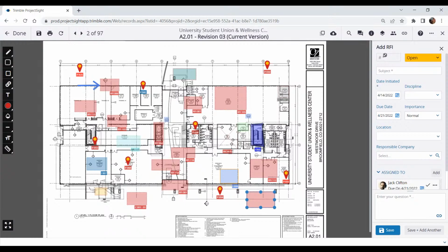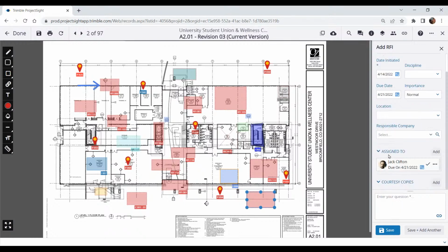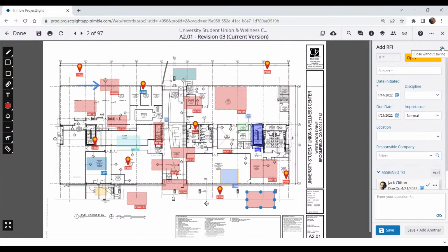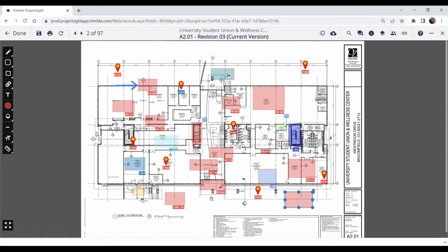As you're creating this RFI, typically all you need to have is the subject, based on the settings that I have now, and my question. I have the ability to come in here and maybe add a photo, or from any field, snap it from my mobile. And as you can see, it's also assigned to a role, because the workflow that I set is saying, hey, I want my RFIs to go through internal PMs before we send it over anywhere else. So that's the idea: everything is underneath your fingertips, easy to use, and a very fast interface where you concentrate on the things that are important to you.